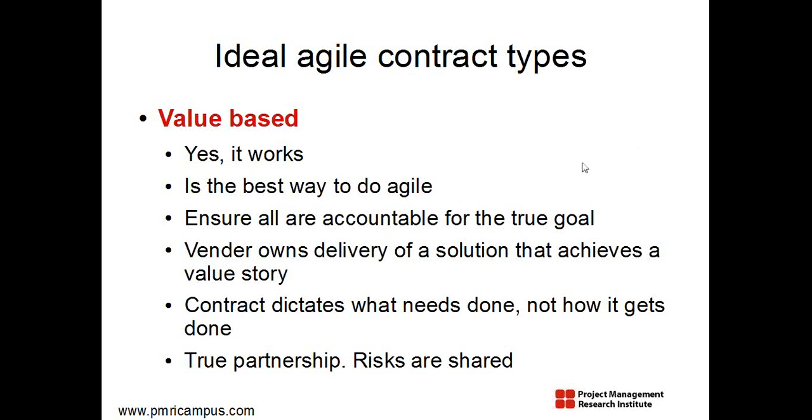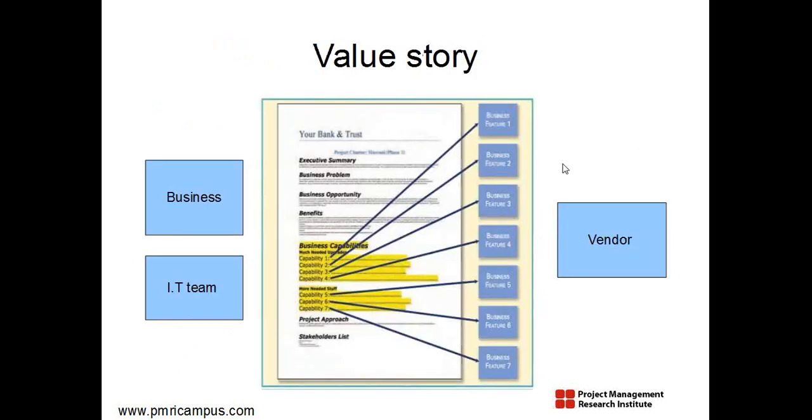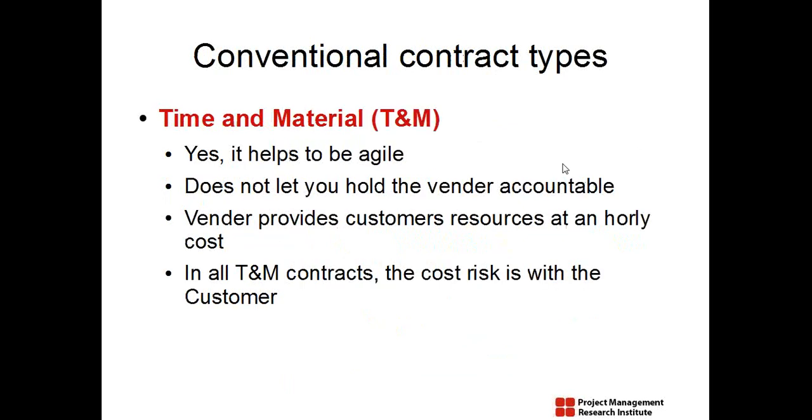I skipped some slides. So time and material, the problem is it helps you to be agile, that's fine, that's good news. But then the vendor is not accountable for the deliverables and all. So every week you submit the timesheets, and based on the timesheets, the customer pays you money.